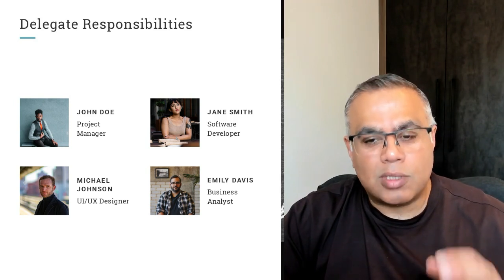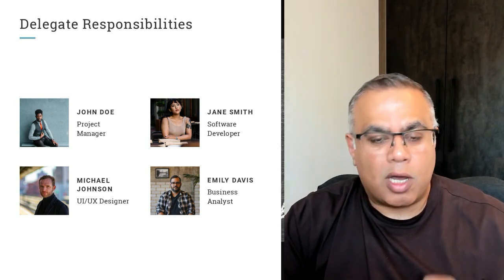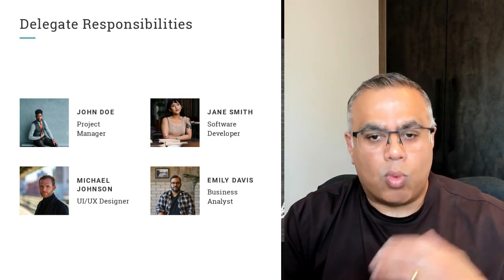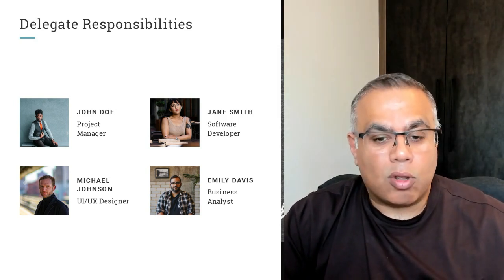Now, how do you decide who to delegate? The biggest challenge here is, who do I give this work to? And this is very much part of your initial planning stage. When you start your initial planning, you'll go through the activities, you understand who does what and what skill set they have. And this is where your communication, which we spoke about before, will help build that knowledge.